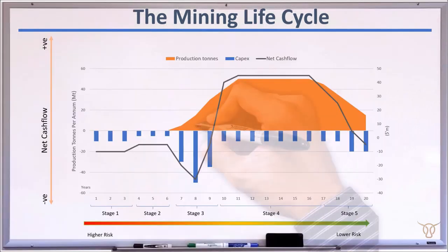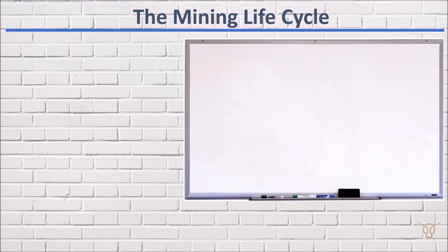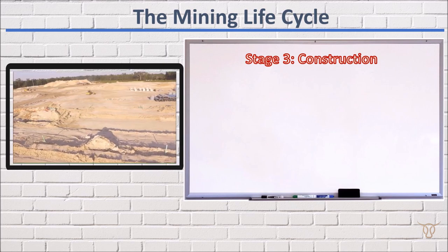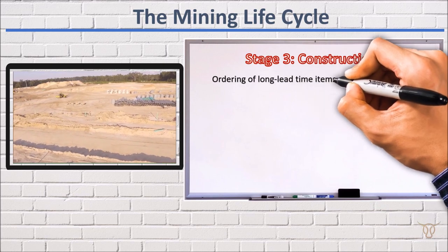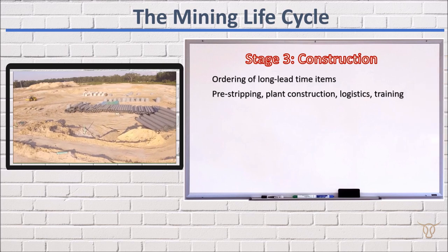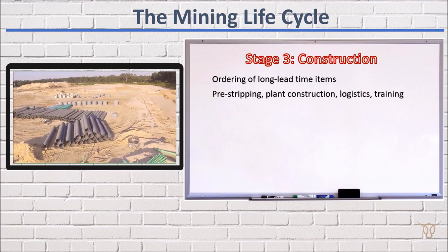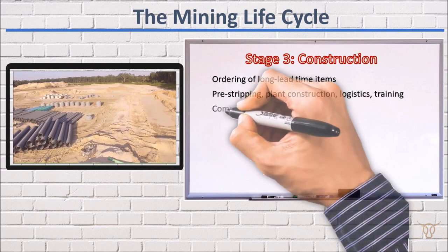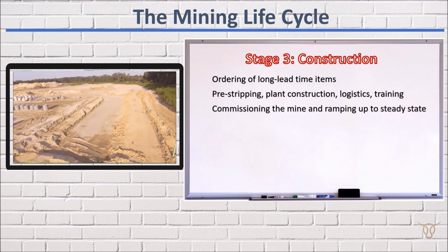Stage 3: Construction. This stage deals with a whole host of activities required to bring the mine into production, starting with the ordering of long lead time items, pre-stripping, plant construction, putting in place necessary logistical facilities such as roads, training staff, and finally commissioning the mine and ramping up production to steady state levels. Sponsors would use the debt and equity funding received in Stage 2 to construct the mine and ramp up to steady state production.